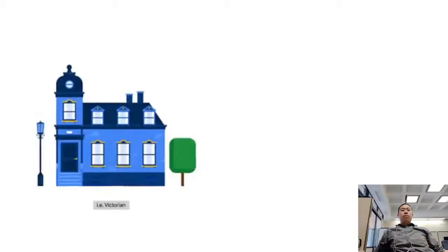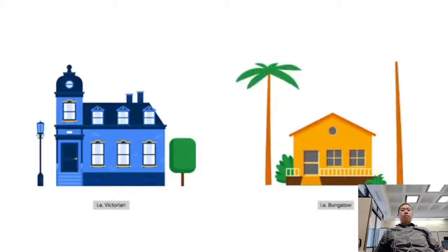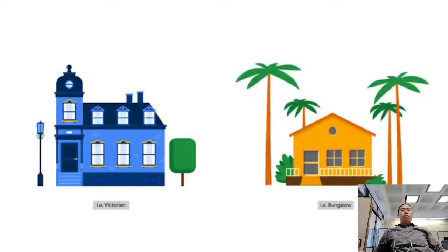There's also a clear goal. You know exactly what the house will look like. It's unlikely that in the middle of building the house, your client is going to decide they'd rather have a multi-level Victorian instead of a single-level bungalow. What's more, even if they wanted to change, it's too late. You already laid the foundation and built the walls for the bungalow. Done and done. A bungalow is what they wanted, and a bungalow is what they'll get. Using this type of linear project management approach, you complete each step in order, stick to the agreed upon specific results, and are able to deliver just what the client ordered.